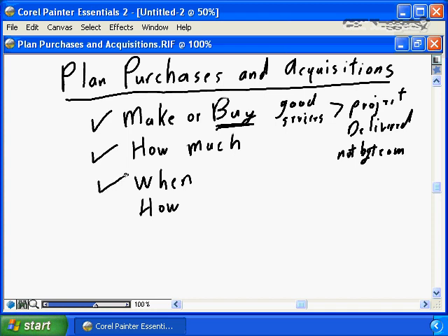Are you going to buy it on the first day of the project, the first month of the project, 6 months into the project? It's important to make your purchase decision and buy your product at the time when the project needs it, so you're not tying up expensive project capital too early, but in the same behalf, by buying too late, you're causing the project delivery challenges because the goods and services required are not available in the time frame that the project team requires it.